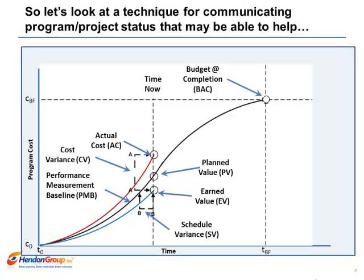Now here's where I am going to deviate from the PMI Project Management Body of Knowledge, also known as the PMBOK, and it has to do with the calculation of scheduled variance. The PMBOK will tell you to calculate the difference between earned value and planned value at time now. This will tell you scheduled variance in terms of scheduled spend, and since spend rates vary week to week, it is difficult to state variance in terms of time.